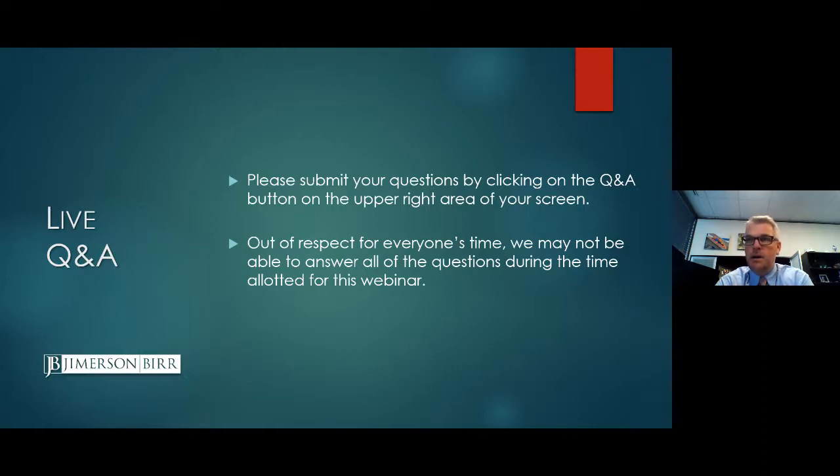And if it's an annotation to the change order or some sort of addendum, there needs to be some reflection that you are not waiving those prior claims. It is only the extra work that you're dealing with to add an additional window. You're going to get paid for that, but everything else remains status quo. So again, make sure you read it.